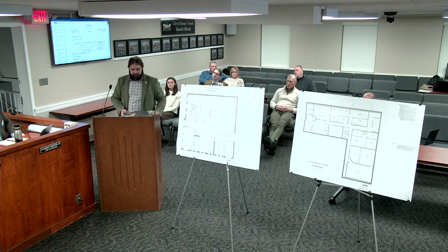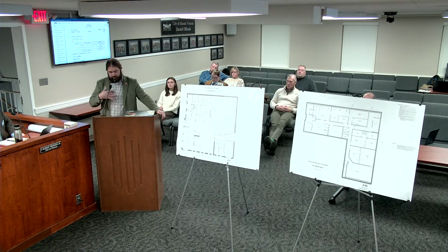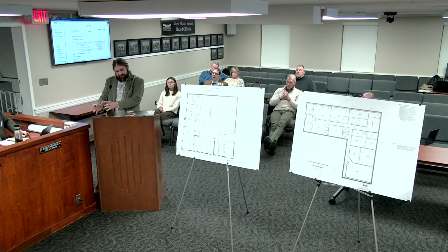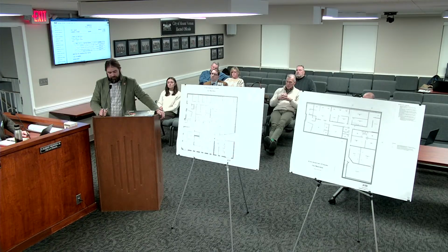One of the things we've worked really hard on, and the whole city staff is trying to think about the building, is doing the lightest touch possible. There are several kitchens and break rooms that already have plumbing. If you've ever rebuilt a house, the most expensive thing you can do is a bathroom or a kitchen, right? So we are trying to preserve those areas and then fit our need around that.